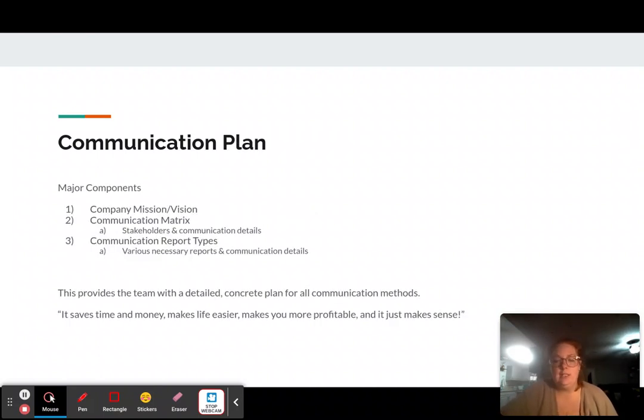Communication plan. This is major for our deliverables, right? The major components are going to be the company mission and vision. That's basically going to say how this project is going to apply to your company. Communication matrix. This is going to include a list of all the stakeholders and the communication details. How you're going to communicate, how often, what format you're going to use, email, meeting, etc.